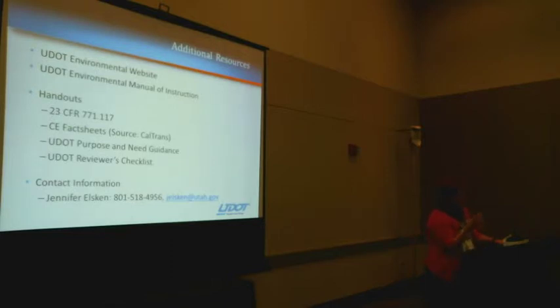So with a CE, it changes on every project, right? It's not black and white. It's subjective. You have to use your best professional judgment. And that's one reason that NEPA isn't done in a vacuum. That's why you talk to your stakeholders and you have public involvement. You can have an adverse effect. You can have impacts to wetlands. You can have an individual 4F impact and still be considered a CE. So that doesn't necessarily trigger significant under NEPA. So it's based on a combination of factors.